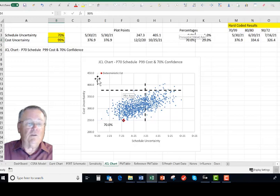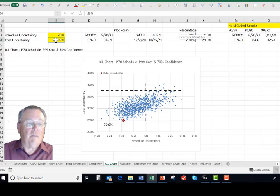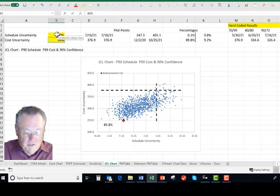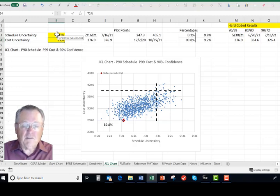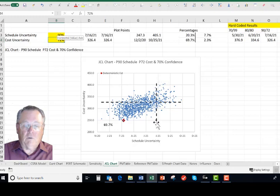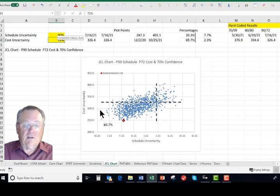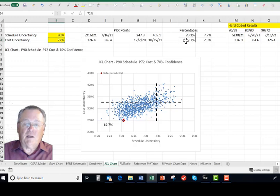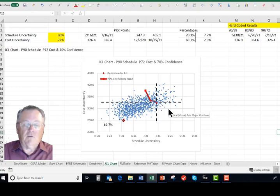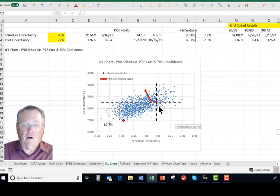What I'm going to do is I'm going to increase my schedule to 90% and then I can reduce this to 72%. So if I go with a 90% schedule, 90% chance I'm going to achieve my schedule, and a 72% chance of achieving my cost, I get to my 70% confidence interval. We can plot these points and see the alternatives for achieving our 70% confidence.